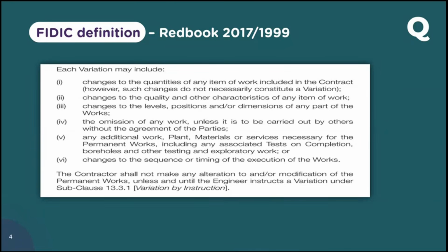But the client is telling, no, I want you to work night shift also. That means timing is changed here. He's telling, I don't want you to work in daytime, let's work only in night time. So night shift is also being added. Whereas when you submitted the tender document, you anticipated only day shift. But now he is telling you to add night shift also. That means you have to find new safety inspectors, safety engineers, site engineers, and foremen for the night shift also, which you did not consider in your tender submission, because you considered only the day shift.